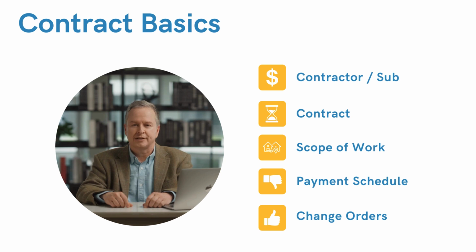Specifically, you want to identify what type of materials they are going to use. Within the contract, you will be clear on the payment schedule. This is especially important if you are working with a hard money lender. Hard money lenders typically pay on completed work, and then funds can be drawn down. Some hard money lenders will be fine with pictures of the completed work. Others will have an inspection clause and only pay after they have an inspector go through and verify that the work's been done correctly. So make sure the contract matches your ability to pay the contractor.